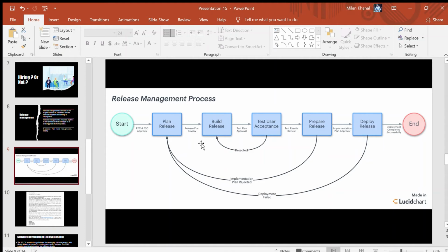During the review, the QA team will conduct final checks to ensure the build meets the minimum acceptance standards and business requirements outlined in the release plan. Once the review is completed, the functional team will validate the findings and finalize the release for the deployment. Before the build can deploy into a live environment, it must be approved by the product owner.